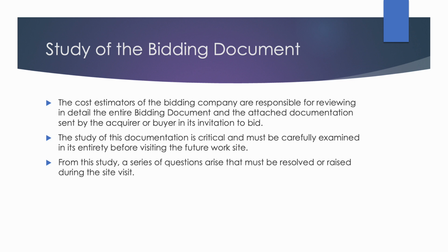The cost estimators of the bidding company are responsible for reviewing in detail the entire bidding document and the attached documentation sent by the acquirer or buyer in its invitation to bid. The study of this documentation is critical and must be carefully examined in its entirety before visiting the future work site. From this study, a series of questions arise that must be resolved or raised during the site visit.